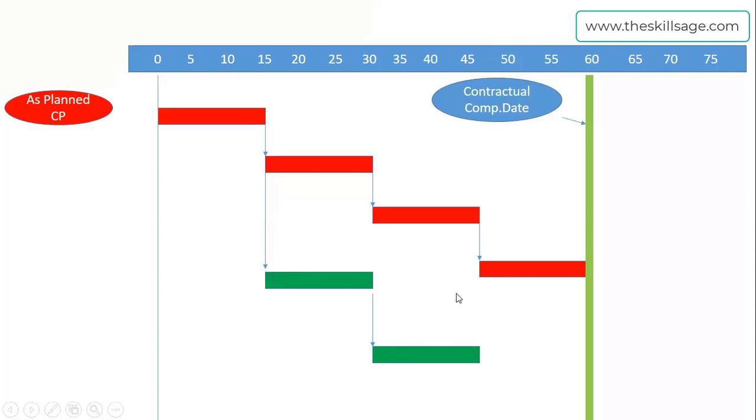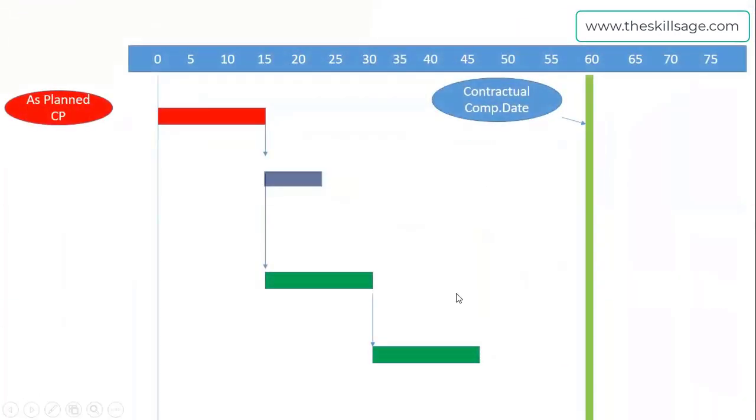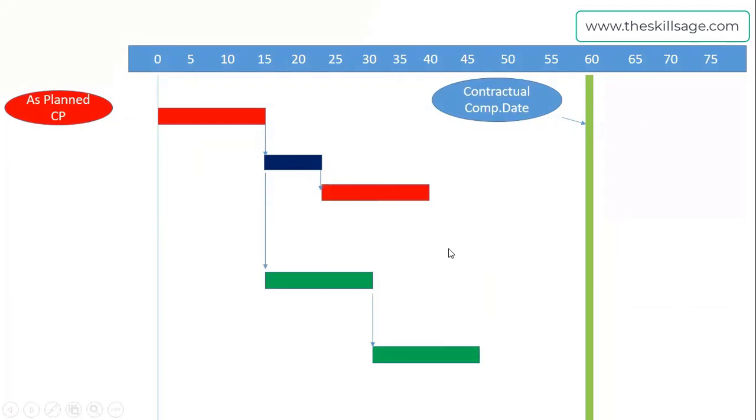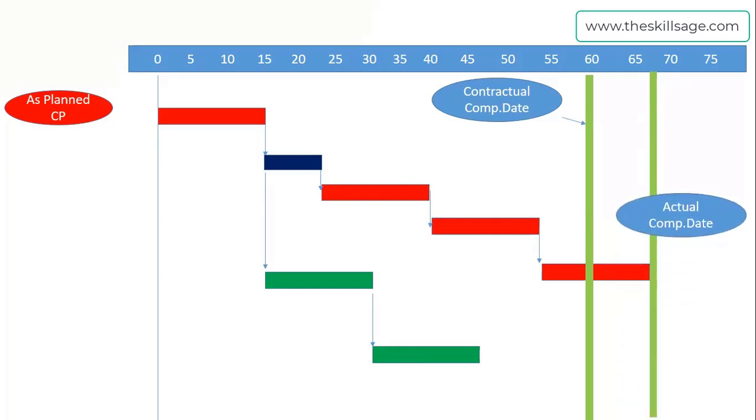On the next slide I will show how critical activities are impacted by delay. This shows what's happening on site on an actual basis, and how your delay on the critical path is going to push your project completion date ahead of your contractual completion date. In the planning phase, float and critical path are locked, but when we are tracking our project, our critical path is continuously changing because in the monitoring phase it is dynamic. It changes with the passage of time and gives us different pictures of when our project is going to complete.